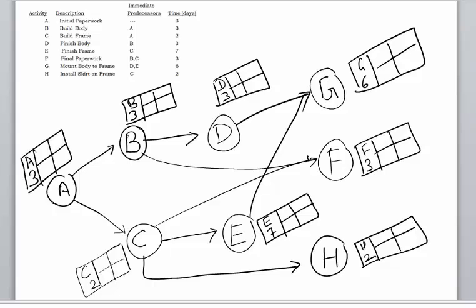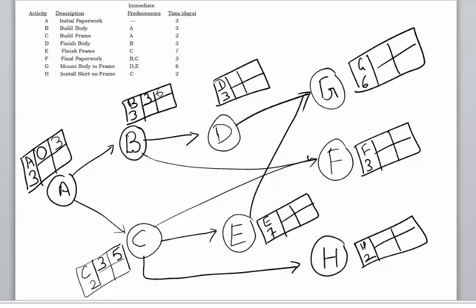Let's first calculate the early start and early finish times. Activity A can start on day zero — it's not waiting on any other activity. It takes three days, so it will be done by day three, which is its earliest finish time. Since both B and C are dependent on the completion of A, the earliest B and C can begin is day three. B takes three days, so it can earliest finish on day six. C can earliest finish on day five. D is dependent on the completion of B, so the earliest it can start is day six; six plus three is nine.